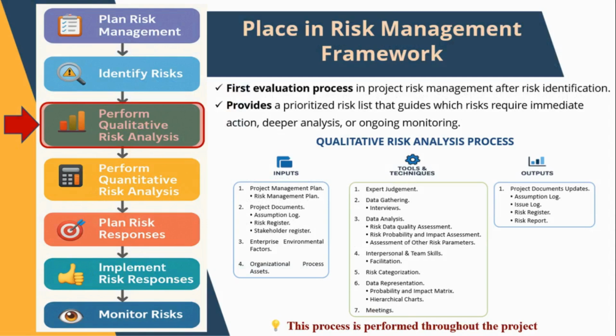Within the risk management framework, qualitative risk analysis is the first evaluation process following risk identification. While it begins immediately after risks are identified, it is not a one-time event. This process is performed continuously throughout the project lifecycle to account for new and evolving threats. Once we identify our risks, we must determine which ones matter most. The outcome is a prioritized risk register that forms the essential foundation for risk response planning. Without this clear prioritization, our risk responses would be inefficient and difficult to justify. Ultimately, this allows us to distinguish between critical threats requiring immediate action and minor risks that can simply be monitored